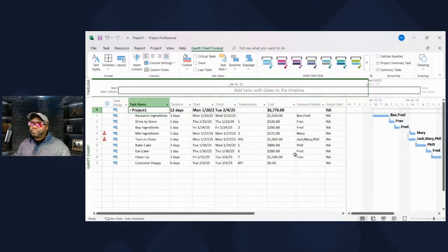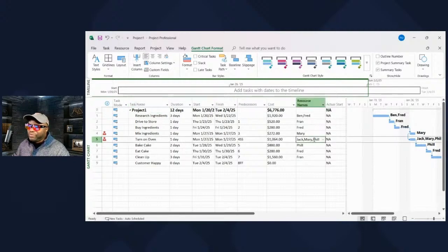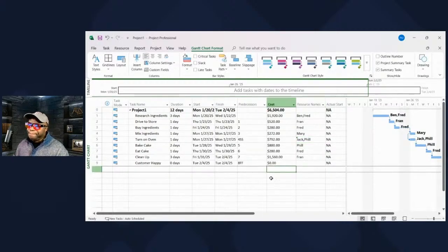So if management has approved this, by the way, we have some resource over allocations here. And what this is telling us is Mary is probably not the best resource to use here because you've given her too much. That's my mentor's name. I always use Mary as one of my examples. So let's take Mary out and the resource over allocations, they go away, right?